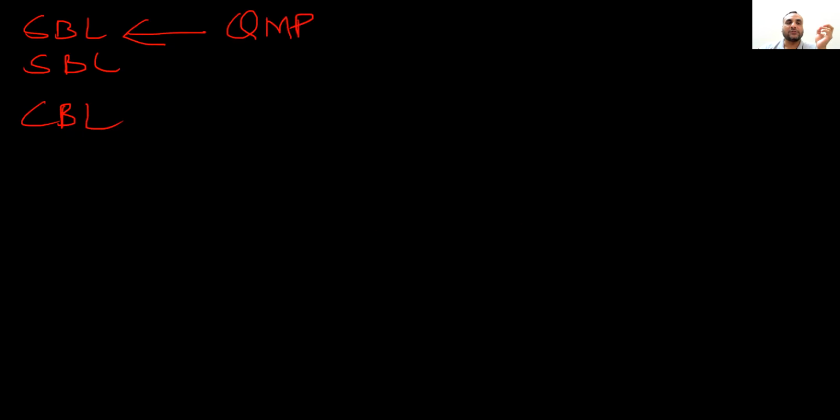So scope baseline is ready, schedule baseline is ready, and cost baseline is ready. And when we were preparing the scope baseline, we already provided the quality management plan, which type of quality we need to complete the project. And if we want to finish the project early, we have to perform crashing, or fast tracking if we don't have money, to reduce the project duration.